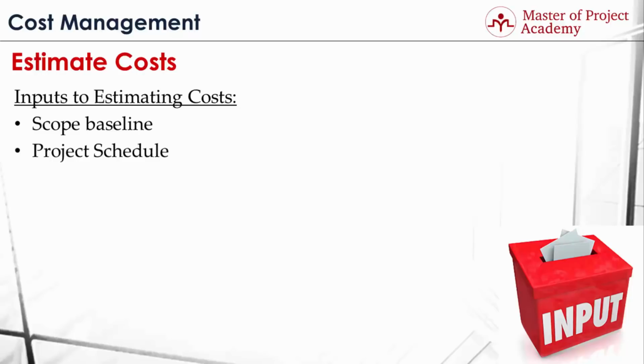Project schedule is an important input to the estimating costs, because timing of something you buy affects its costs. For instance, for a construction project, costs of the materials might be increasing during summer, since construction works are speeding during summer. Or if you're purchasing materials with a foreign currency, currency fluctuations over time might affect your costs.